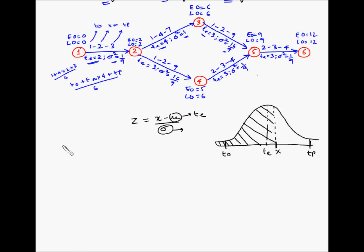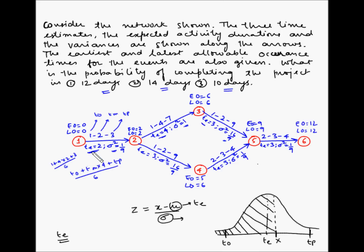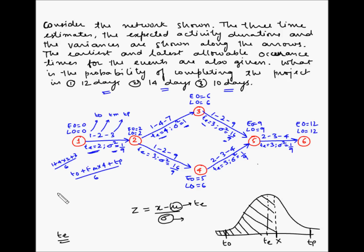Let us start by finding mu, the expected duration of the project. The expected duration of the entire project will be the sum of the expected durations of the activities on the critical path, because the critical path is the longest duration on the project — it cannot be delayed and represents the entire project duration. So first we have to identify the critical path and the critical activities for this project. There are various methods to do this.